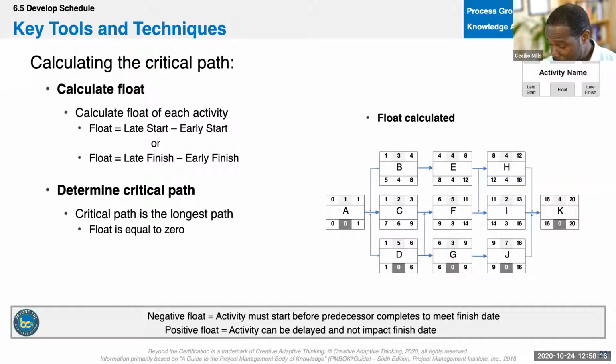Yeah. So if this was an implementation project, then these activities right here are where, if you get any delay to any one of these activities, it will delay your project. See, I have activity 1. These 3 are dependent upon it. So any delay to activity 1 is going to delay the start of these. So if I get a delay of a day here, it's going to show up here.